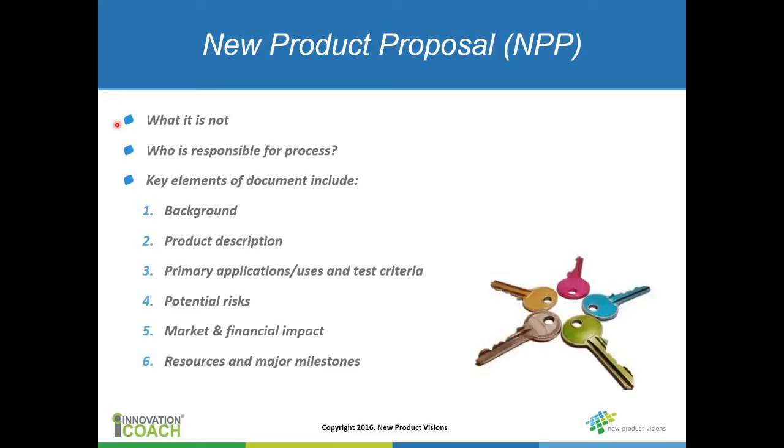The project team will be set up for failure, and senior management will be disappointed when the project doesn't come to market as expected. And unfortunately, a lot of times dates get cast in stone at this point, maybe because of a trade show or some external deadline and so forth, and you have to be very cautious of defining the end game depending on the risk within the project.